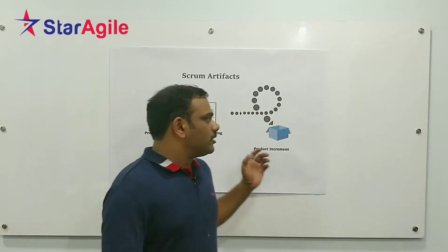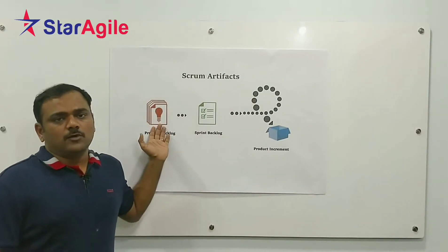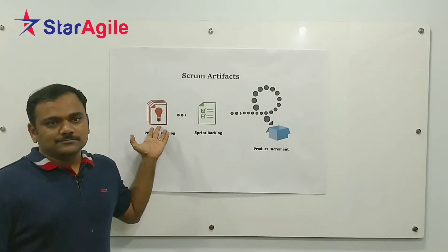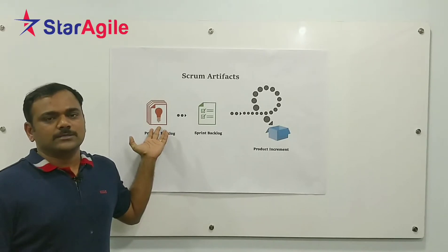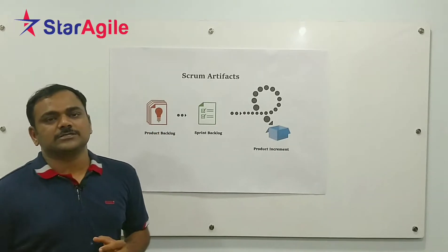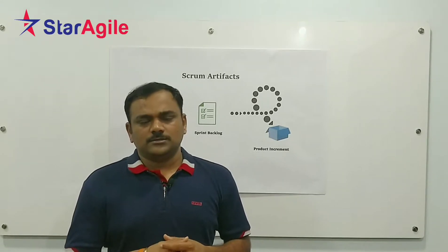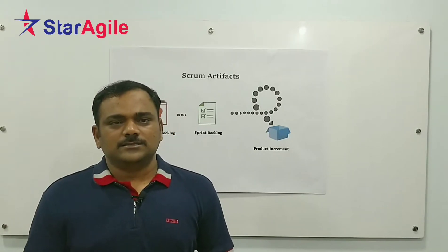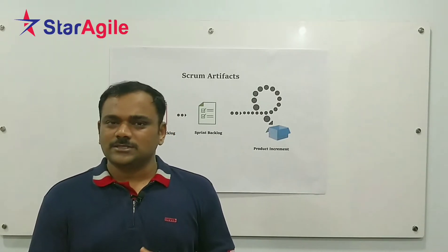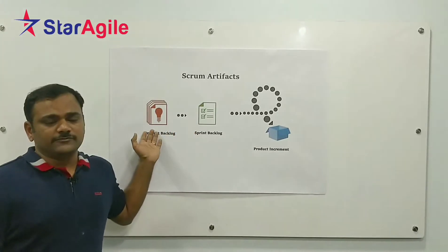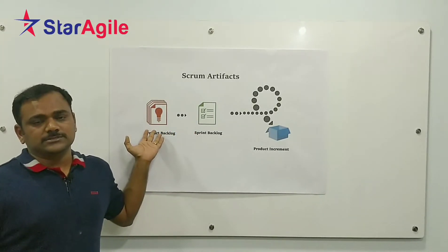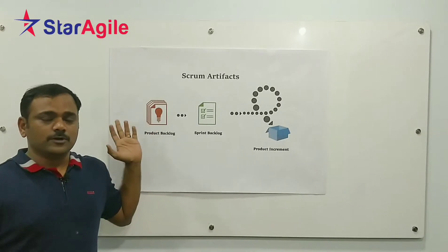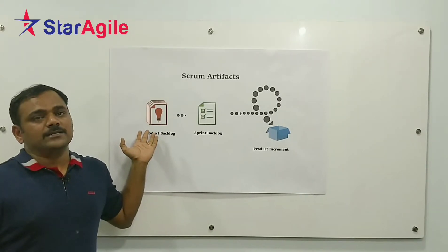Product Backlog is owned by the Product Owner. Product Backlog is a prioritized — or more precisely, ordered — list of features that might be included in your product. The Product Owner is interacting with stakeholders on the business side, understanding their inputs, requests, priorities, and issues. Using that information, the Product Owner creates this ordered list of features that would help cater to the business needs.